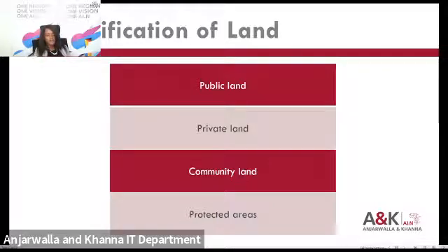The government will then be required to go through a compulsory acquisition process, make the requisite gazette process and the consultations with all the landowners and other users of that land, and make an award before utilizing the land for the project.